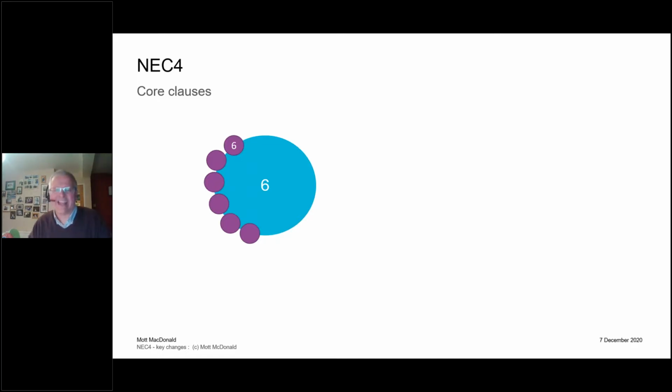You can write that into the scope, but you've got to be very careful that you don't start telling the contractor exactly which subcontractor to use. If you do that, you can't get away. It's what we used to call the nominated subcontractor in the old days, and it always causes problems because in theory you're getting the contractor to take the risk of that person, but if you told them they've got to use Fred and Fred turns out to be useless, you're going to end up in a problem. I'm not sure I've particularly well answered the question, but I'm going to stop there.